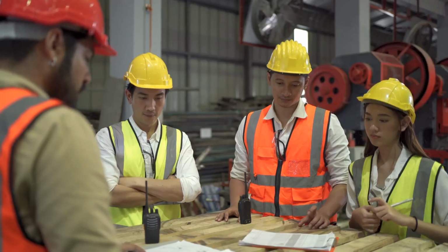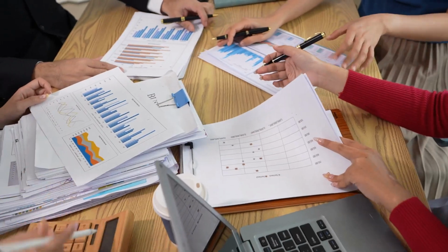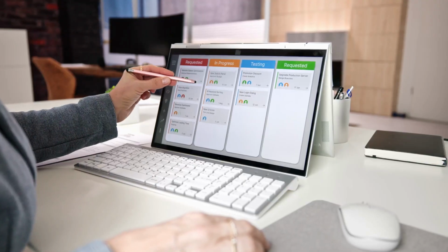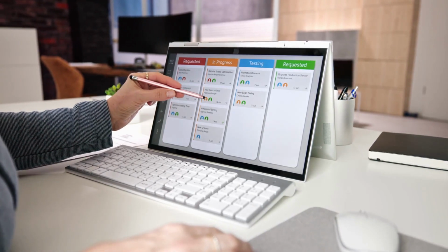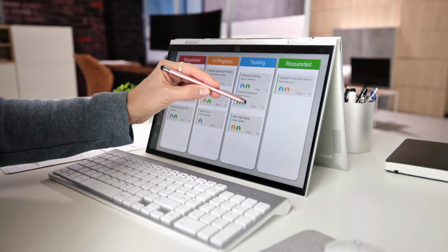Let's put it in context. A manufacturing quality team is tracking internal audits and CAPAs. Before Kanban, data is scattered: emails, spreadsheets, notebooks. They implement a digital Kanban board. The columns are audit scheduled, in progress, findings logged, CAPA issued, and closed.